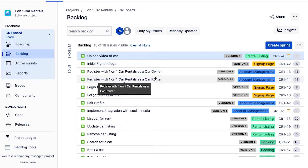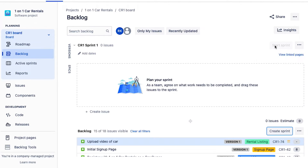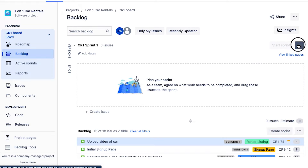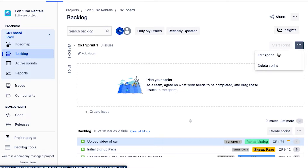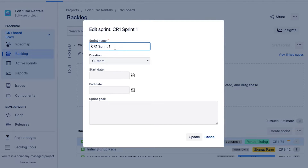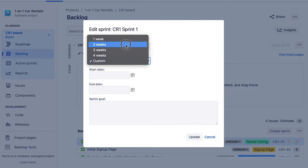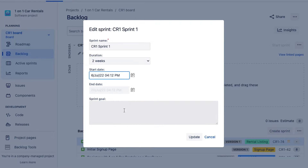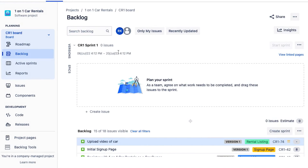With those details prepared, the first thing you want to do is create a sprint in JIRA — done by simply clicking the create sprint button, and you'll notice this section appears. You can set a few details for your sprint by clicking on the ellipses or three dots and selecting 'Edit Sprint'. From here you can add a sprint name, set your sprint duration and dates, and also set a goal. The sprint goal is typically something the product owner decides upon. Hit update and it will be saved.